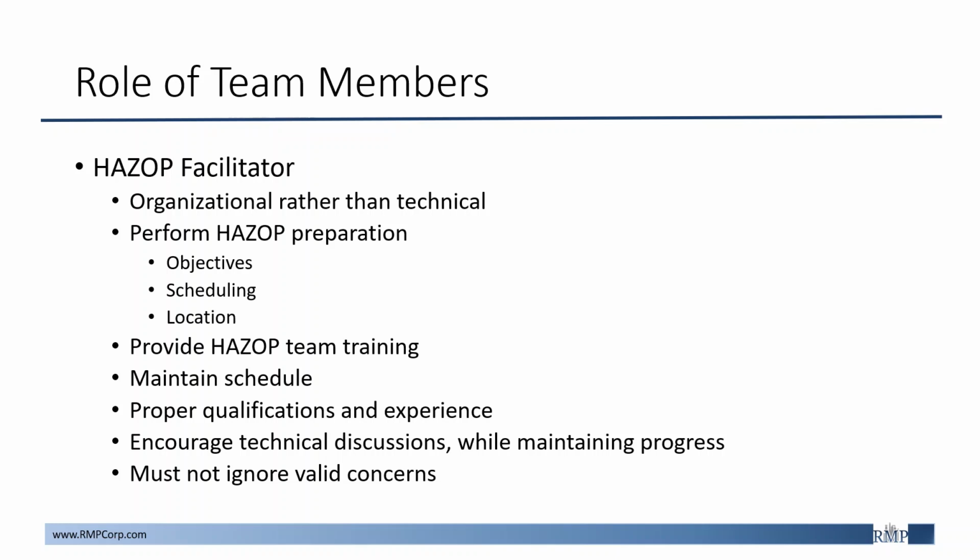They are also aware of the timeline predetermined during the preparation phase of the HAZOP study and must keep the flow of the study going to ensure that the timeline is in fact maintained. This is actually extremely important during sessions where scenarios are investigated and design discussions occur that go on for longer than necessary during the HAZOP. It is important to note that the HAZOP is meant to review hazards of the current system but not have design discussions performed during the session that may be performed outside of these HAZOP sessions.